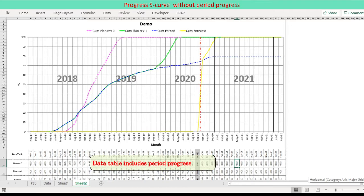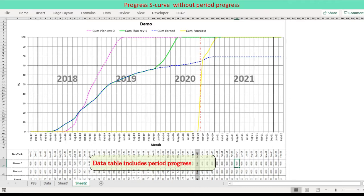Data table includes period progress in addition to cumulative progress. Chart does not show period progress columns, though.